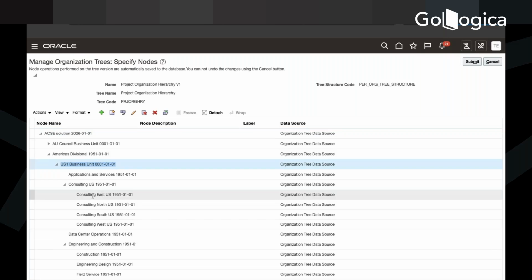When an employee is created, they are tagged to a BU and also to a department. So the burdening will happen on the BU as well as the department. Because you remember when we create a cost, we provide one expenditure organization. That expenditure organization is nothing but the department. The department we are defining as the expenditure organization.